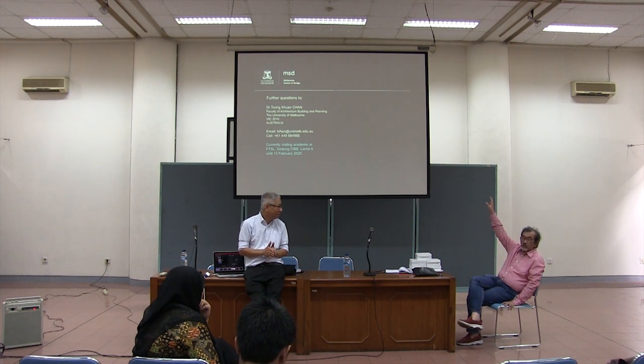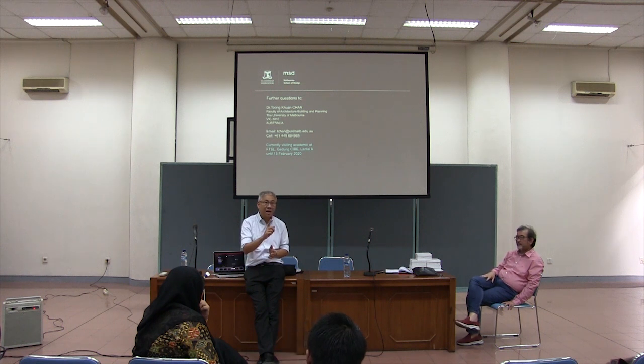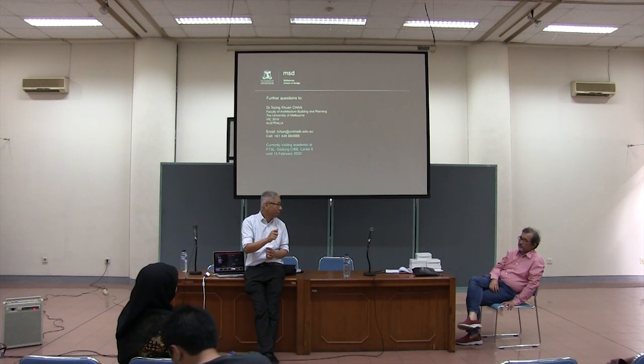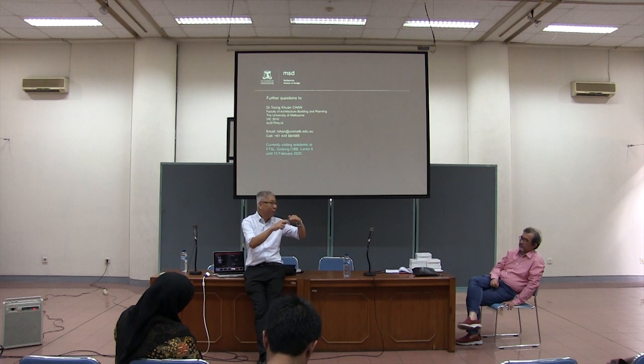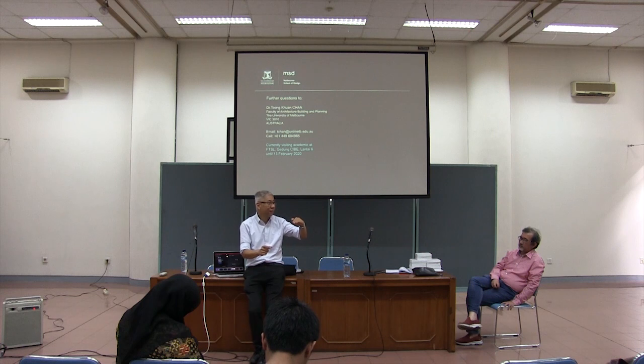So right now the labor is your unit here. Yes, 1 hour of labor. And data from Indonesia is not good because I'm using skilled worker cost. Your workers are rarely skilled. They are coming from the rural area. Yes, migrating. So your cost figures are wrong because we are using skilled worker cost, whereas the actual worker is even lower cost because they are unskilled.